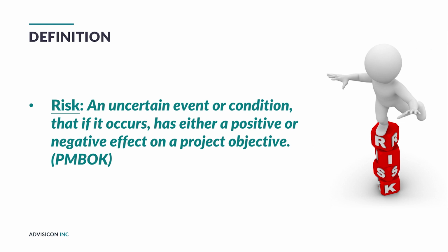I also like to call out the difference between risks and issues. Some people confuse the two, especially if you're on a project and you're reporting and maintaining an issue log and a risk log. It's very important to understand that a risk is something that has not yet occurred, and you have a planning process around it to deal with it should it occur. An issue is something that has occurred. And so again, there's a whole process around dealing with issues.